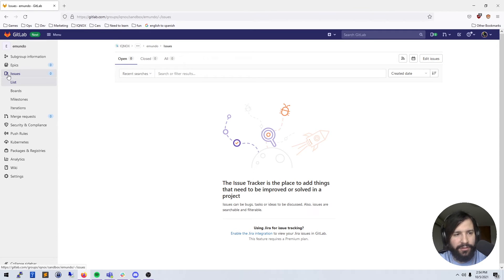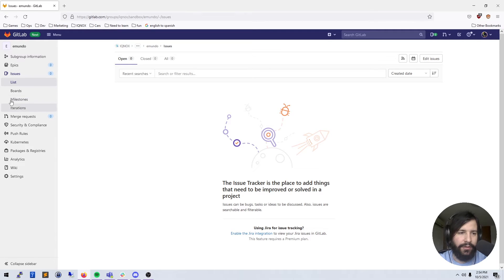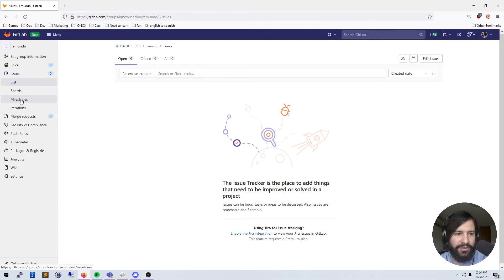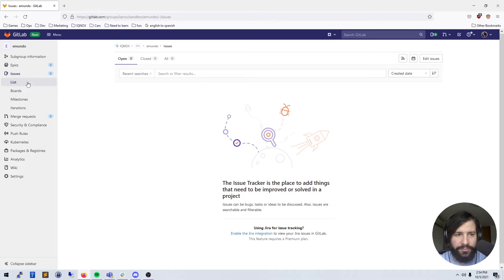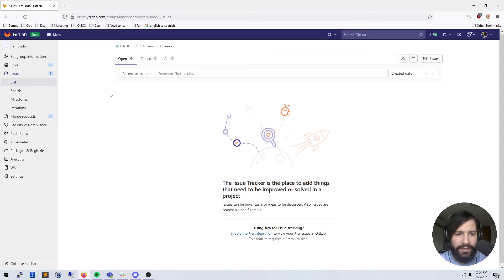So the next place we have is issues. These are like user stories. And then also inside of here we have milestones, which are sprints inside of GitLab. So your issues are user stories, milestones are sprints. You're gonna have a list view, so if this had issues inside of it, we'd see one after another with descriptions and who's assigned to it and what labels does that issue have.